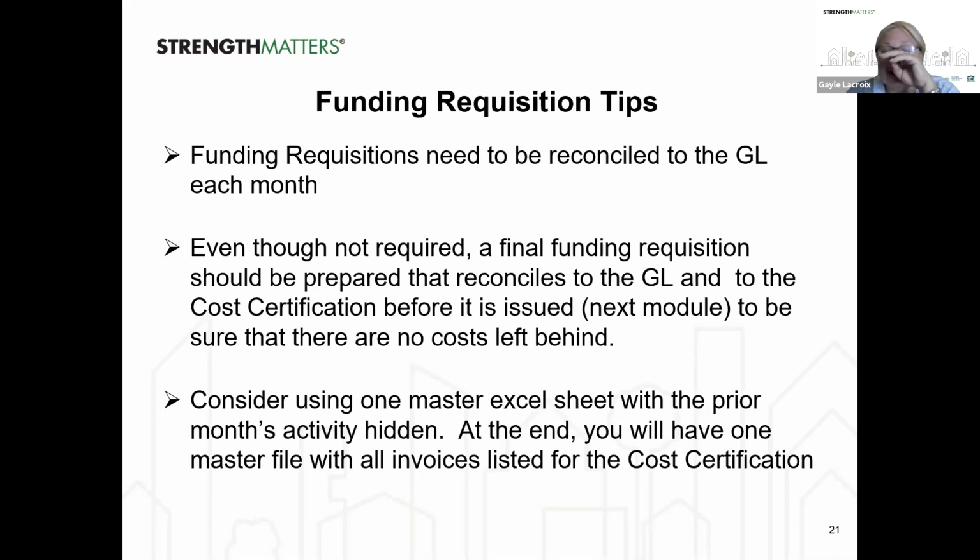Okay, so just some tips, and I think we've gone through them. You need to be reconciling monthly those funders' requisitions, even if you're not preparing them. Make sure you reconcile them. I think I told you, if the development folks are doing it, I've seen the development folks submit the same invoice on multiple requisitions, so maybe in April and then again in June, because they're not reconciling to the GL. I've seen them not requisition invoices at all, so I'm sure, like lots of you, chasing invoices is a full-time job,